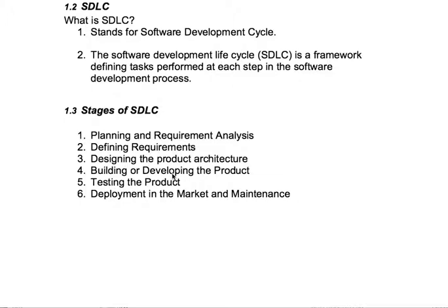So what we need to do is look at our project and see how much time we have available. If we could get an additional resource to help out with the project, you've got to remember they're coming in blind. So it's going to be hard to get that additional resource unless it's just a big coding standpoint and anybody could code it. But if you could allow yourself some time, maybe you're working on a task where, hey, you know what, you finished it 3 days earlier. If you could figure that out, then you could add it within your current timeline, and it's a lot of extra work, but you also have to go and communicate with your project manager and make sure that there are extra hours available, or like I said, you have to figure a way of making it fit in your timeline.